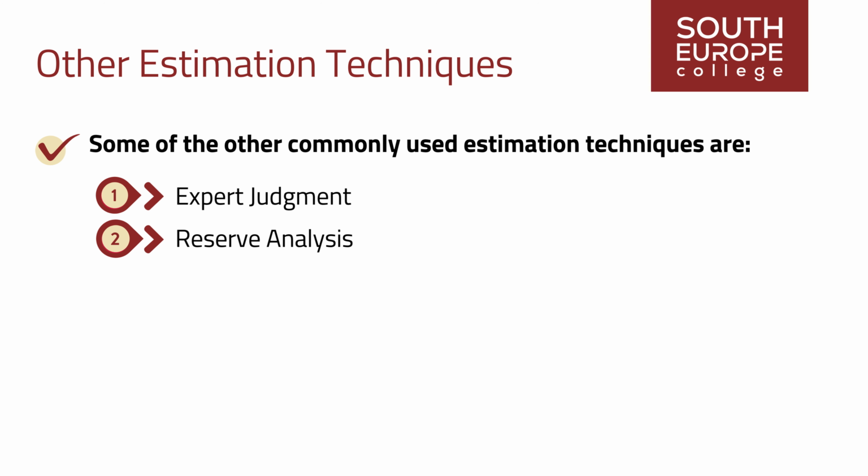2. Reserve analysis. It involves adding contingency reserves to project estimates to account for uncertainties or risks. Contingency reserves can be time reserves, schedule contingency, or cost reserves, budget contingency, and are intended to cover unforeseen circumstances.